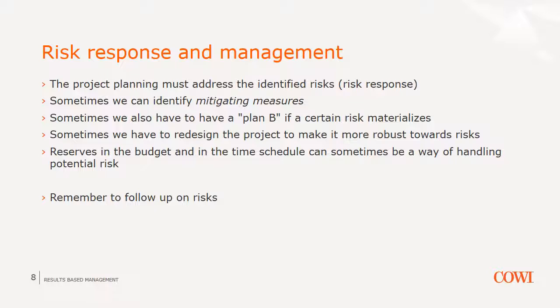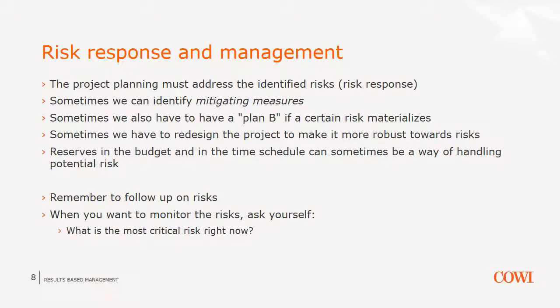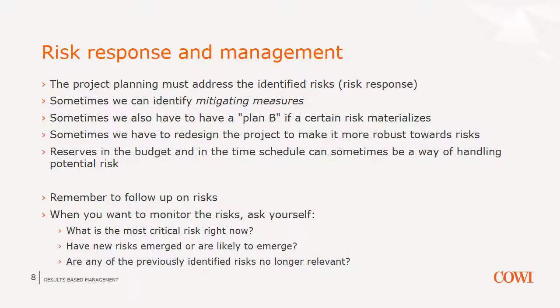When it comes to risk management in the implementation phase, the key thing to do is to monitor the risk situation. You want to find out what are the most critical risks right now. Have any new risks emerged, or can we see some risk emerging? And finally, are there any of the previously identified risks that no longer are relevant and can be discarded? Good program managers, they monitor not only activities, time and resources, but also assumptions and risks.